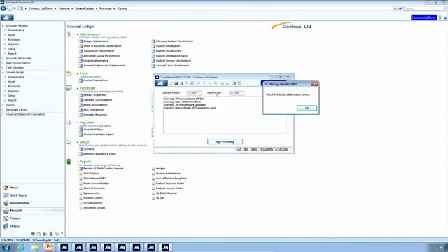So these warnings are intended to give you insight into things that still need to be processed within your data modules. In some instances, it will still allow you to close because they are warnings. But the nice thing is project will actually let us set the period back and reclose it if we find later that these transactions need to be processed.